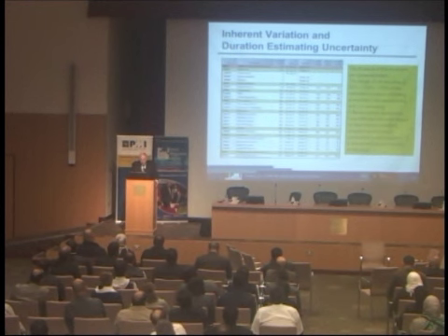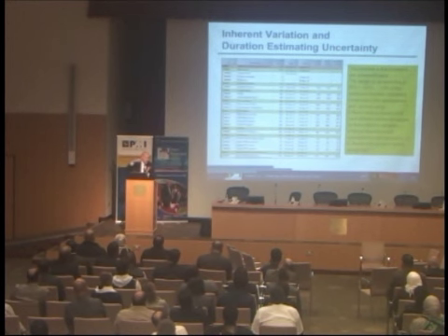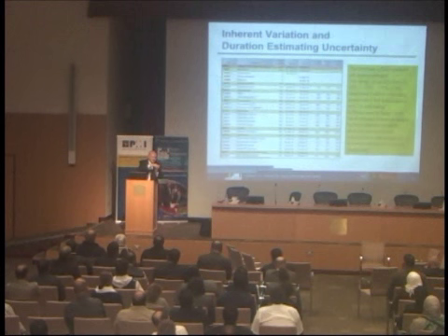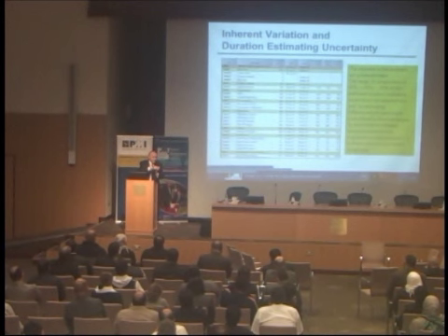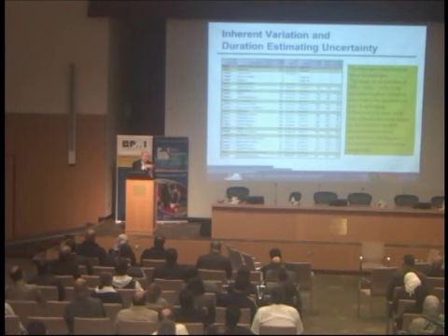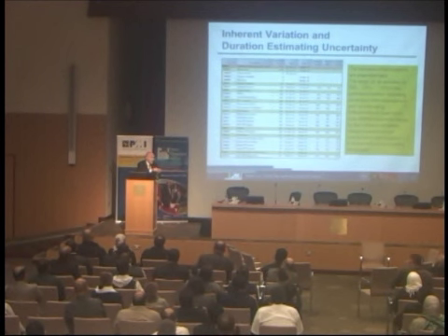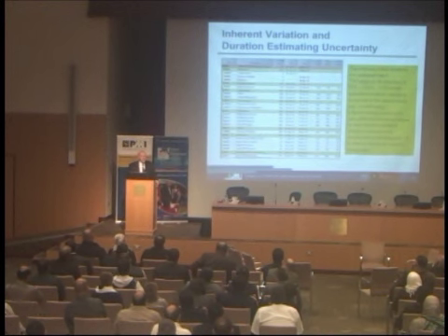The second thing, which I don't think I've got in this presentation, is the merge bias. When parallel paths go along in the schedule and then there's a merge point, the latest of the two merging paths determines the date of the merge point, right? The latest of the two merging paths determines and under some circumstances, one path will be latest. In some other circumstances, the other path will be late. In some circumstances, both paths will be late. And in some circumstances, both paths will be early.